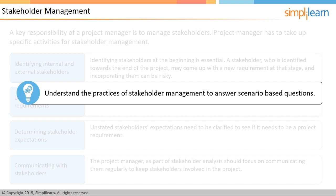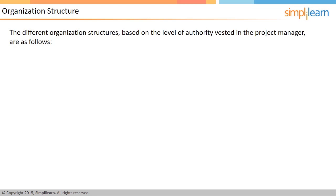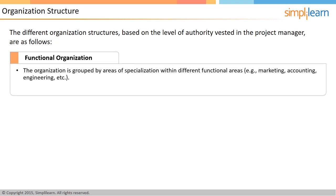Projects are performed in an organization and the functioning of the organization might affect the project. The different organization structure types are based on the level of authority that a project manager has. In a functional type of organization, the organization is grouped by area of specialization within different functional areas — for instance, marketing, accounting, engineering, etc. Each employee typically reports to a functional manager, and projects are normally undertaken within the department itself. If a project requires assistance from another department, the request moves from the head of the requesting department to the head of the concerned department.